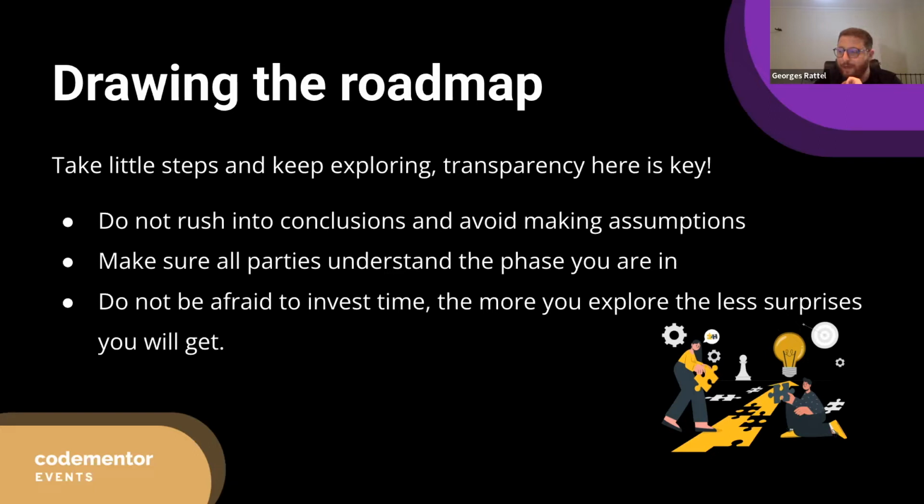So for example, if you develop the login page and then the main page to list, let's say, the main users of a platform. And then after defining that page and testing that page, you go ahead to testing the profile page, and then suddenly you start getting feedback on the page before. And then the feedback on the page before might affect the profile as well and the whole timeline of the project.